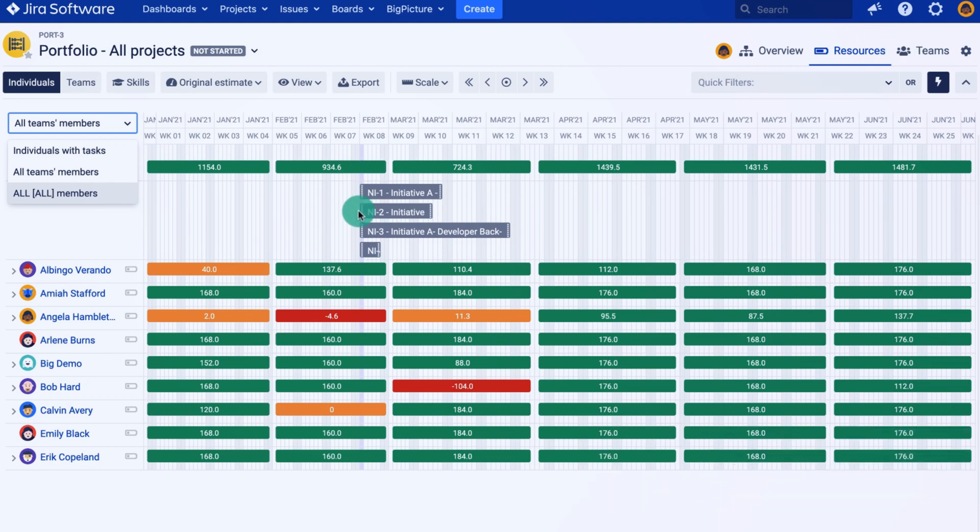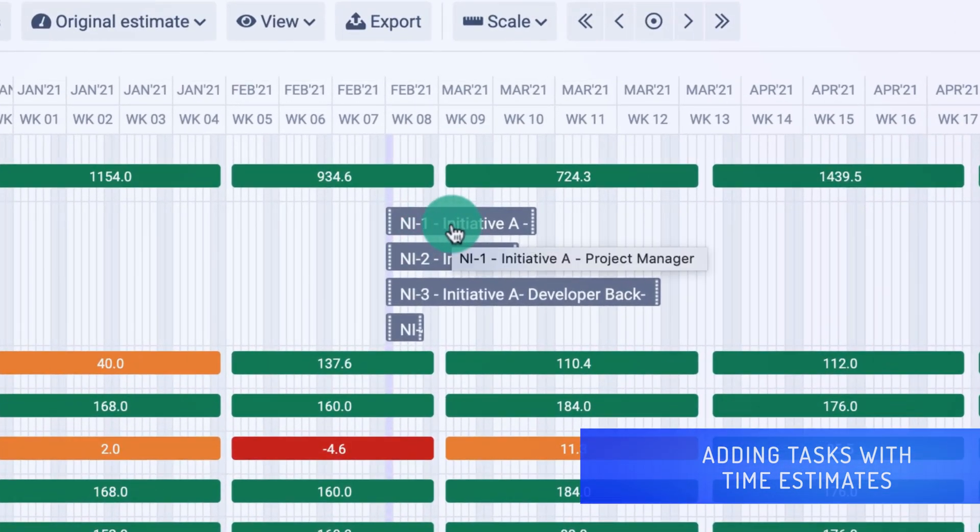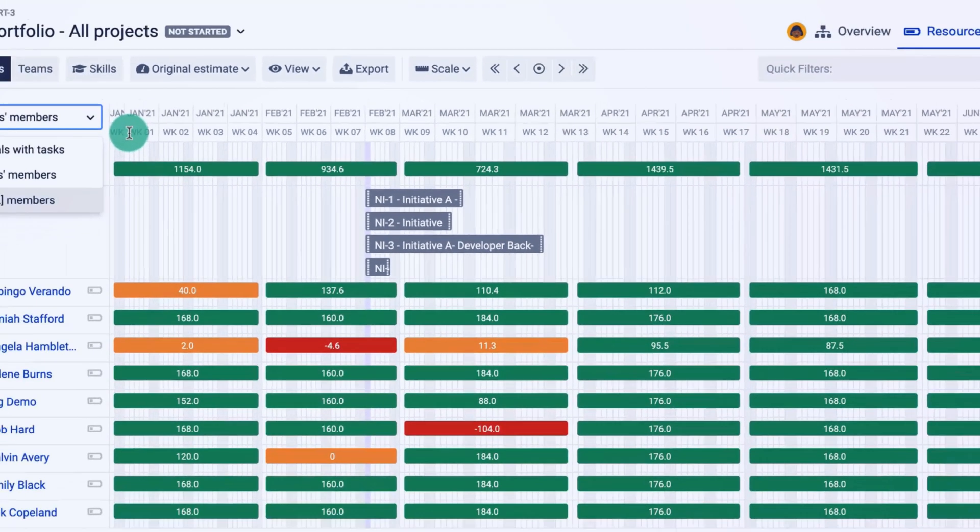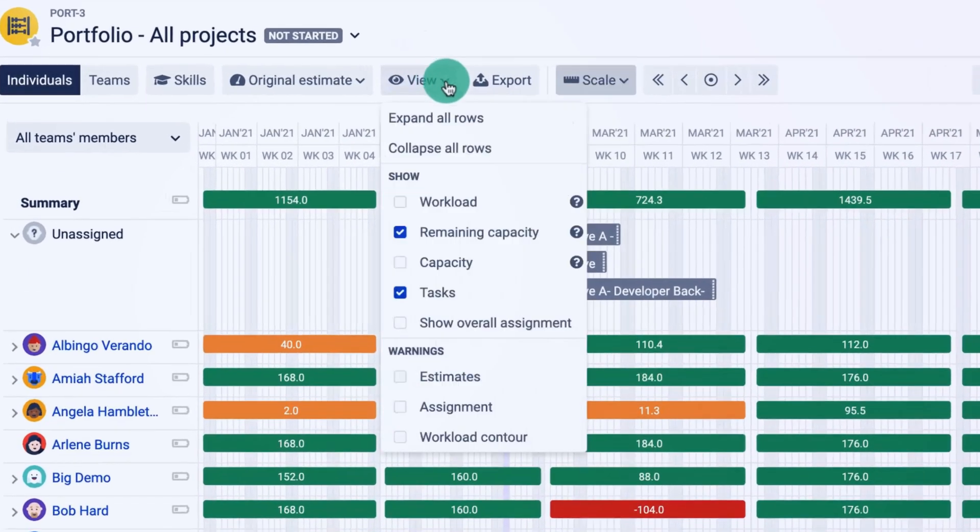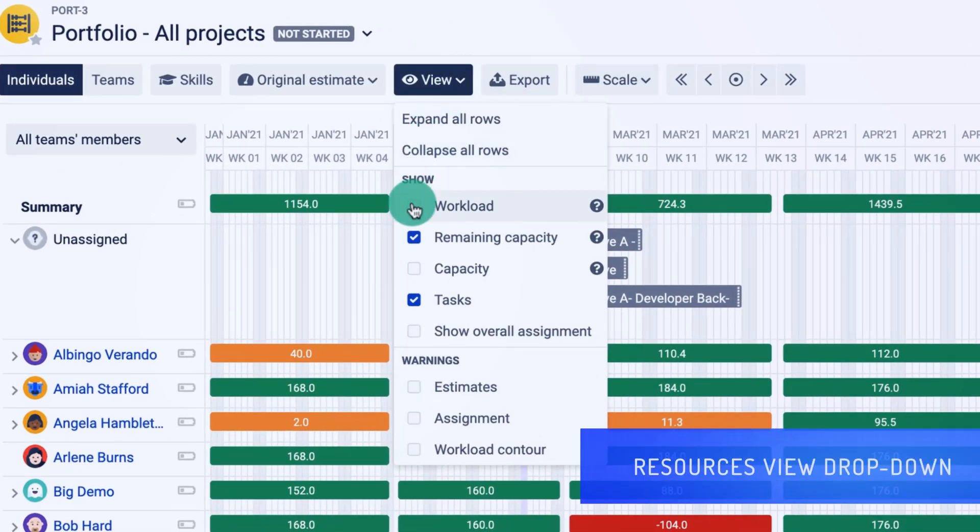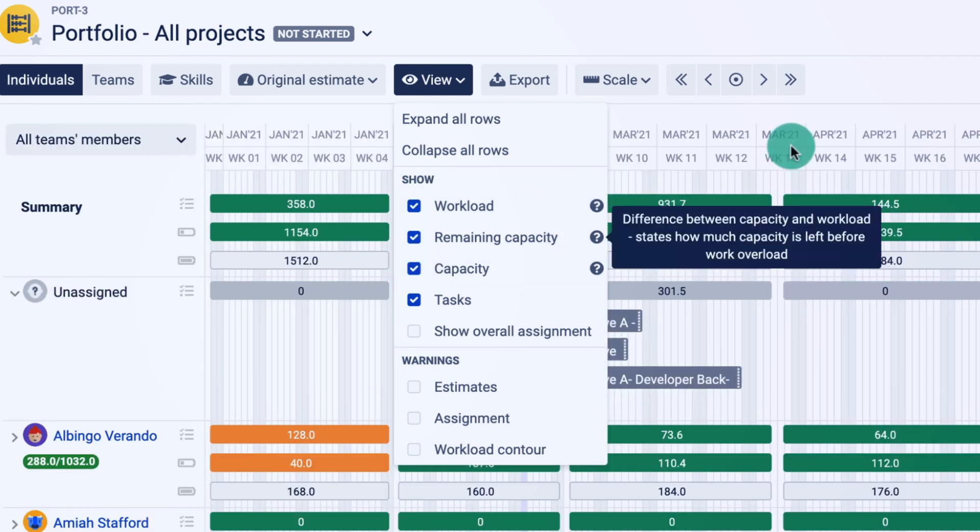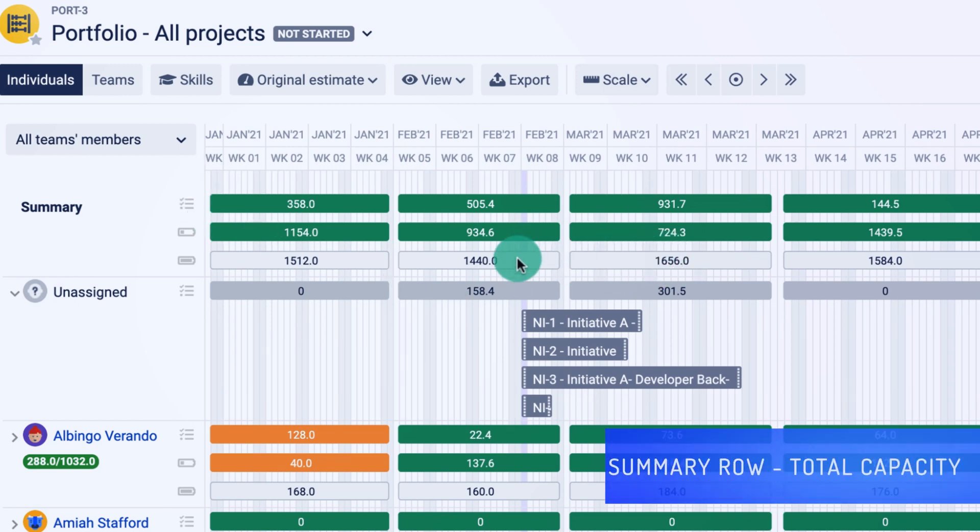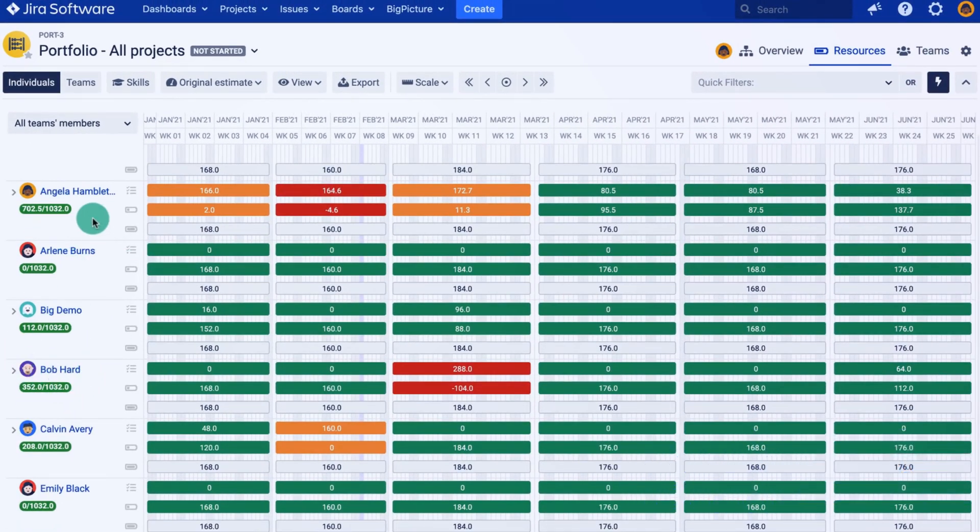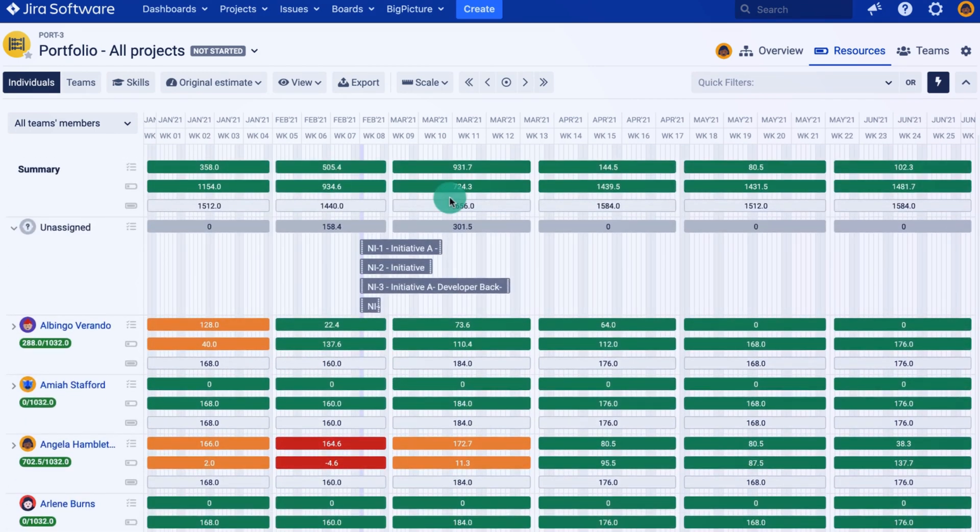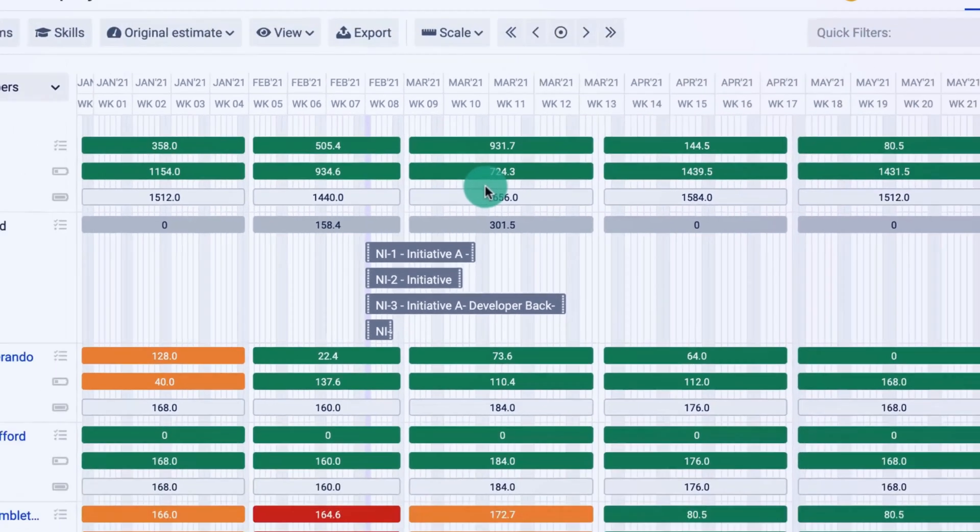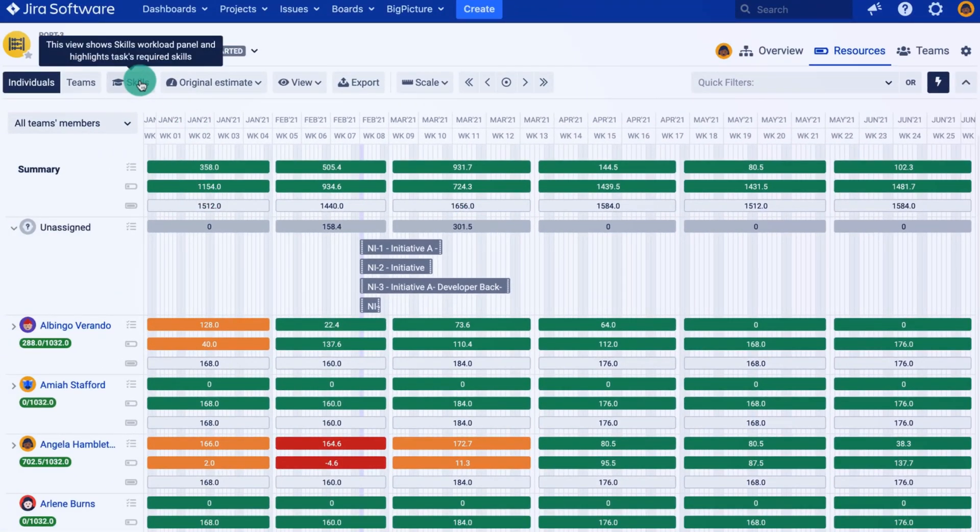Now I've added the tasks, and I first set the estimate. As you can see, the end date for each of these tasks were calculated automatically by the app. This happens only when the task is added to the scope for the first time. Now let's adjust this view a little and show also the workload and capacity. Right now, in the summary row, this is the total capacity, the sum of all these team members. We are in the green, so that's good.